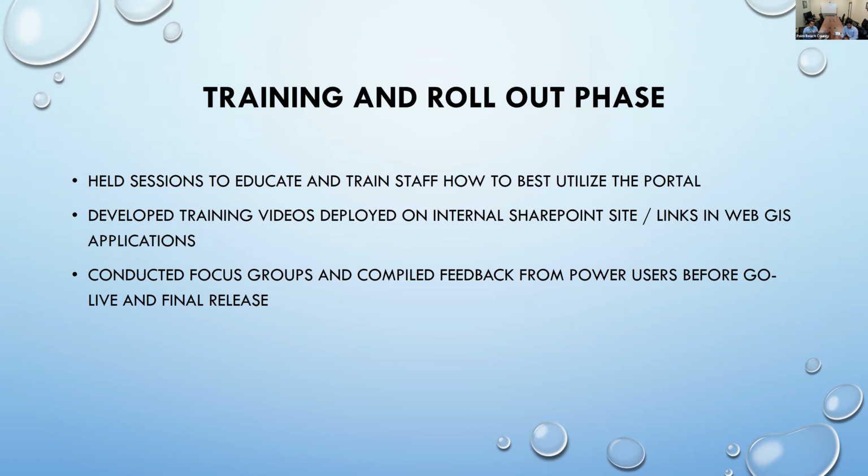We have the sewer summary dashboard that we just presented to the I&I team, and that gives you different totals for what we currently have in our infrastructure for different lift station boundaries: total counts of manholes, total amount of line pipe, and the total number of gravity main. This is used for forecasting costs to contractors when they're tackling lateral lining projects for different lift station basins. They can see how many lateral taps are within a particular lift station, and if it's been inspected in Granite Net, because this information is coming from Granite Net. And they get an idea of how many more manholes need to be inspected when they're gauging work for different lift stations.